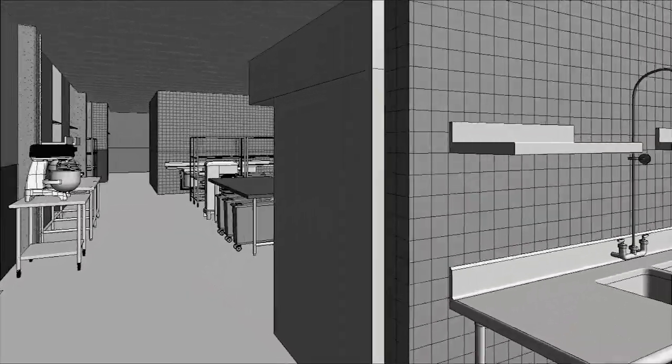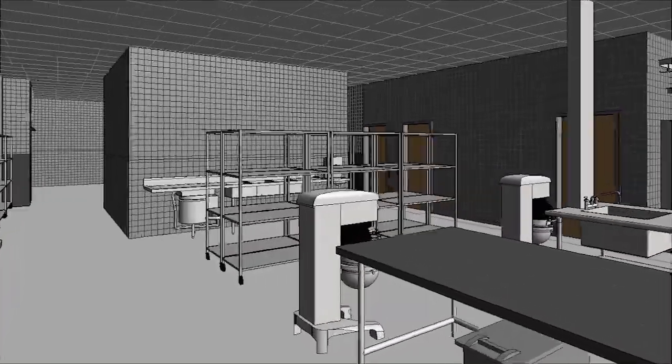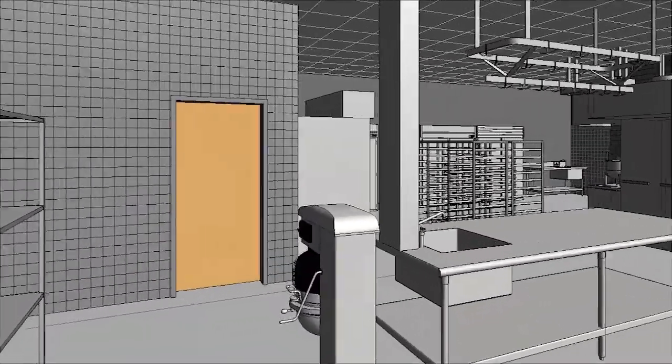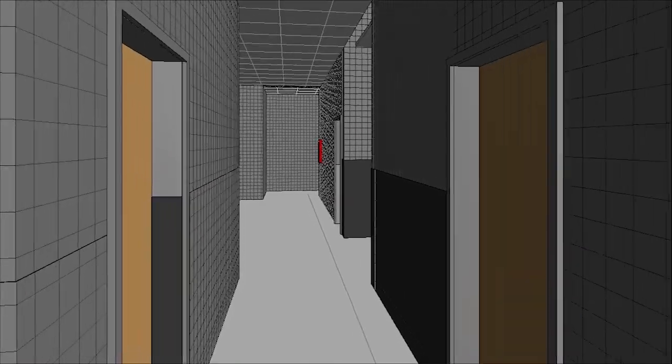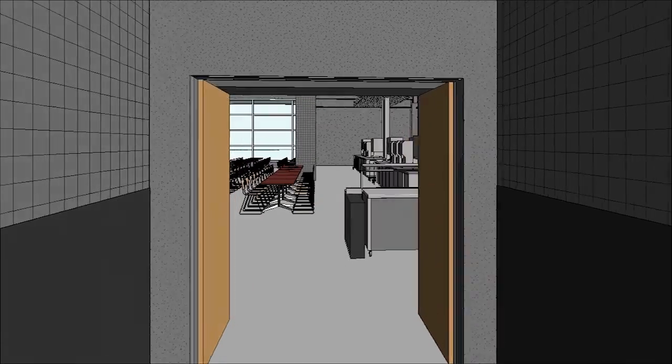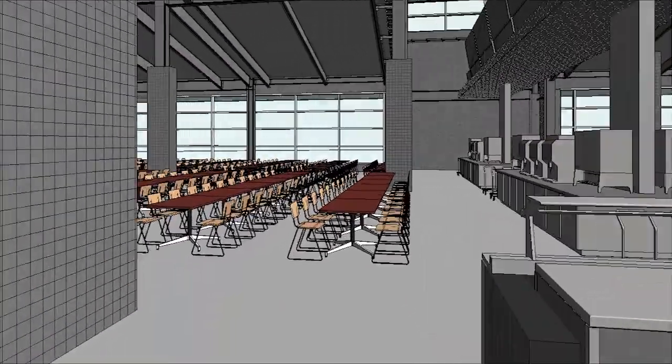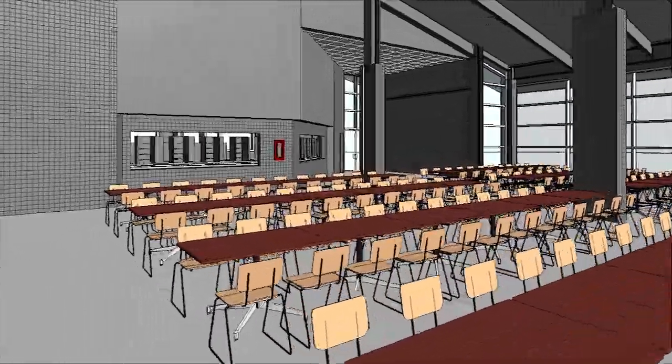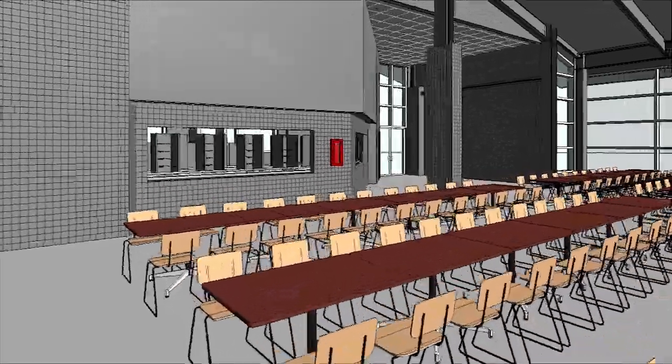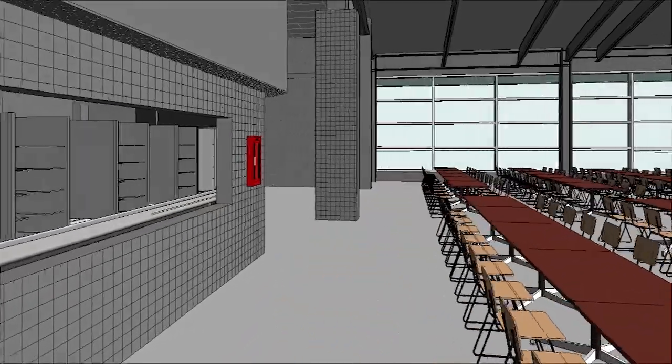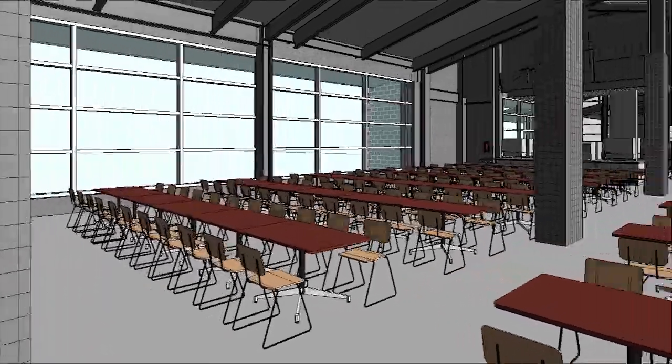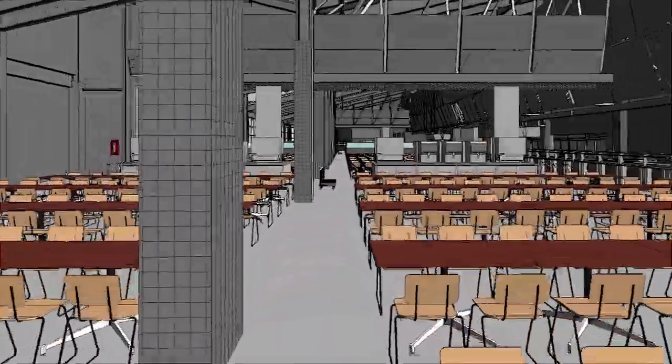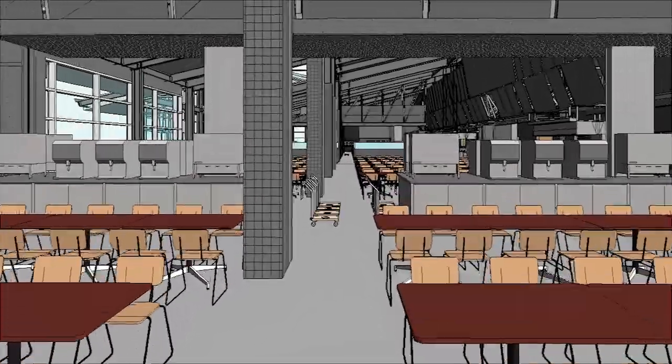This seven million dollar contract value, and that's the food service scope contract value, is part of a larger fifteen point seven million dollars in total contract value for food service that we've done that had some type of BIM scope to date. And yes, the bulk of this value was in some type of design build form and this project is a perfect example of a design build type construction deliverable for the client. One guaranteed price from the general contractor then gets all of the consultants and subtrades in line to build it. And definitely this is one of the highlights of these tools as far as marketing and visualization for a client, to be able to show the client exactly what you're going to get instead of requiring them to try to interpret what their project or what you're trying to deliver is going to be in its end form from 2D plans, elevations and sections.